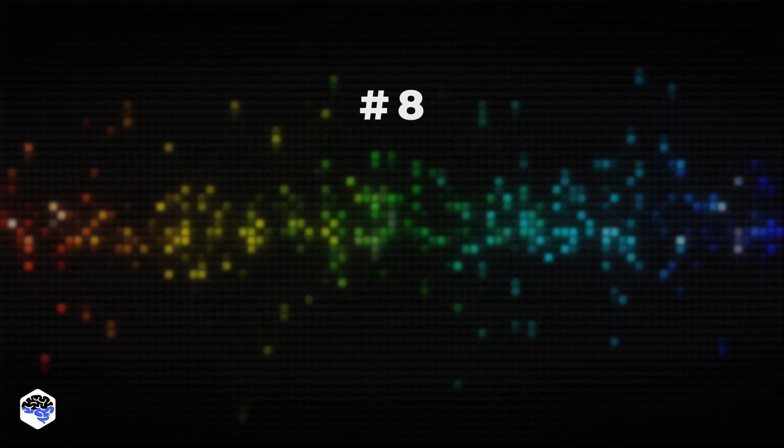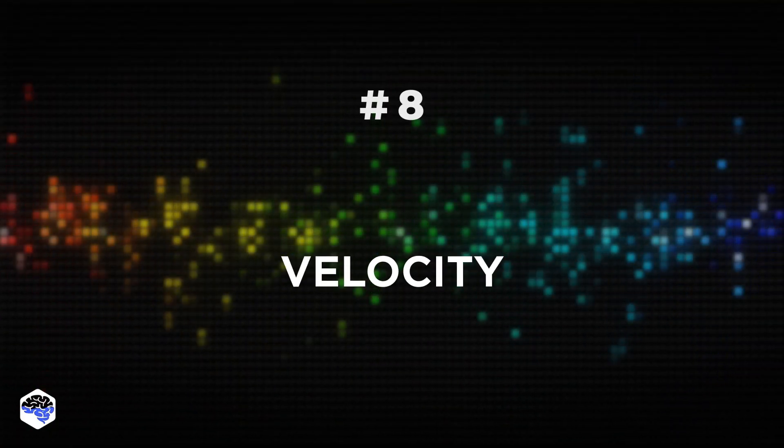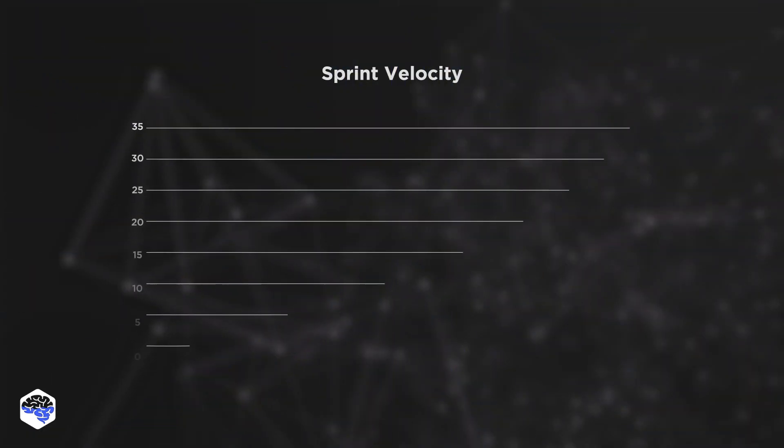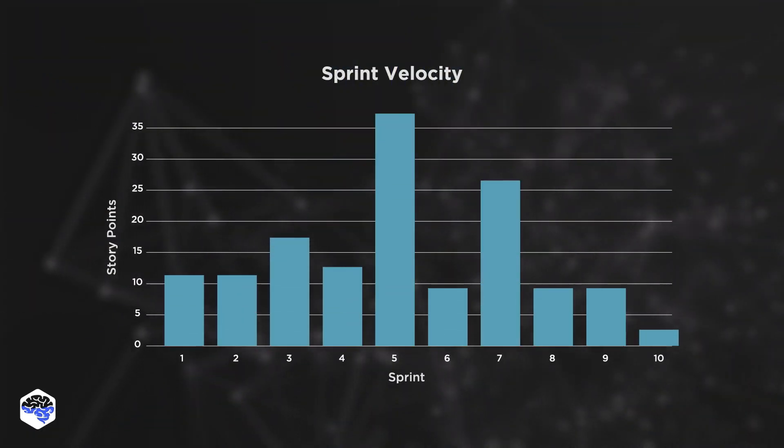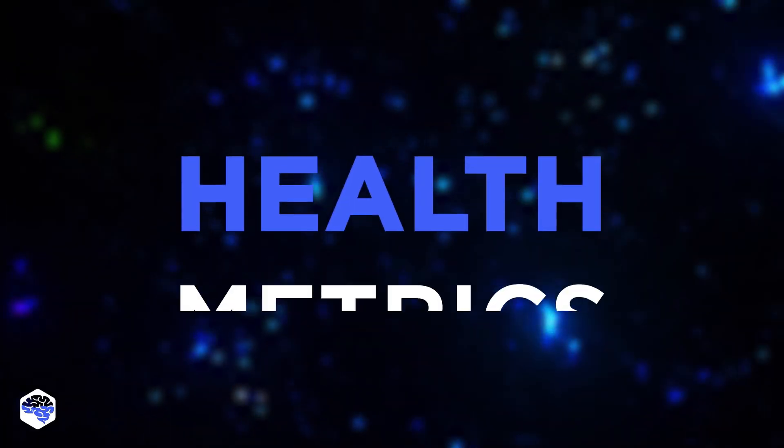Finally, we need to mention velocity. This metric evaluates the number of completed story points over a particular period. Based on your history, you can foresee time expenses for future story points. A decrease in the team's velocity can point to misunderstandings among team members or indicate tasks that are harder than previously anticipated.